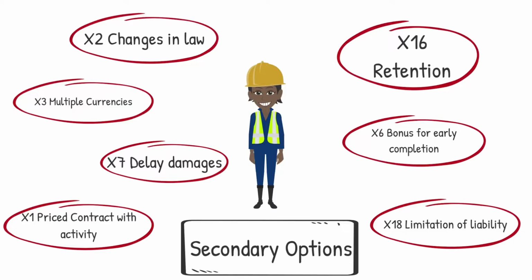If a contract is less than a year, there will be no CPA, which means you will not have X1, right? And then where a contract is done locally, but there's a portion that is also included for overseas, you will have your multi-currency. And then, like I said earlier, in most of the contracts, you will have your changes in law clause, because each and every contract, should the law change, it will also need to change, right?